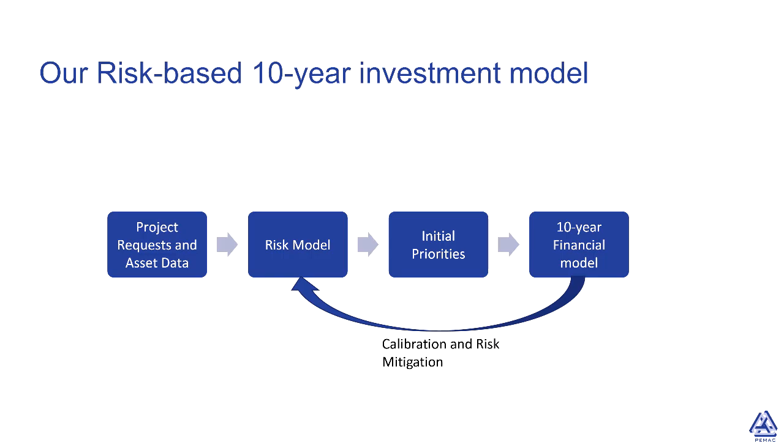We can now look at different scenarios, looking at different amounts of funding. And now we can go to finance and say, okay, this is what we want to do. If we get less money, this is what we're doing instead, but this is what's chopped off, and these are the risks. So it's a much more intelligent way going forward.